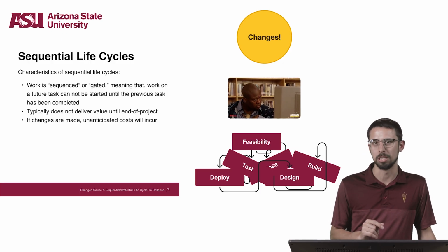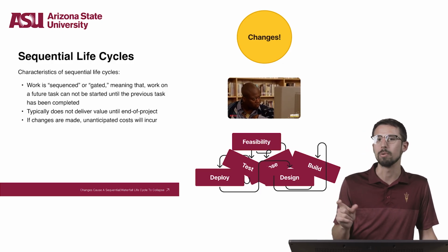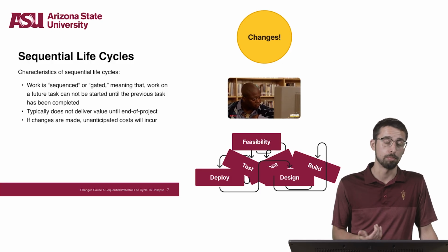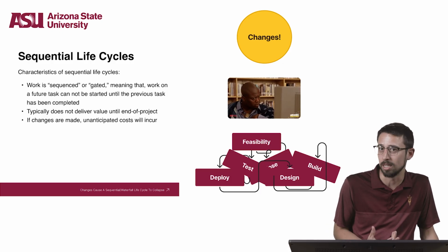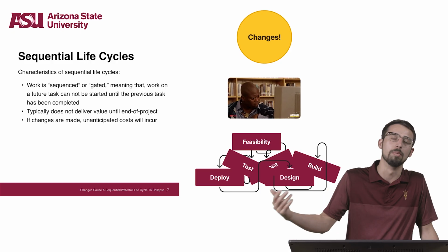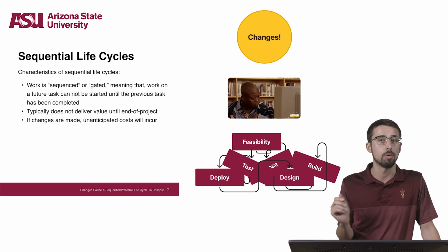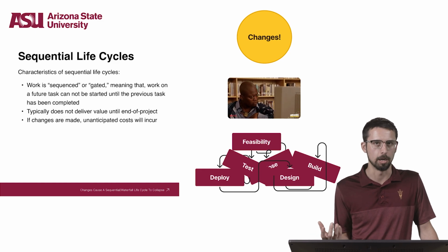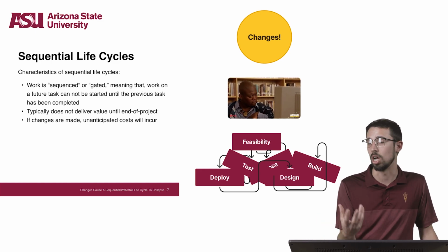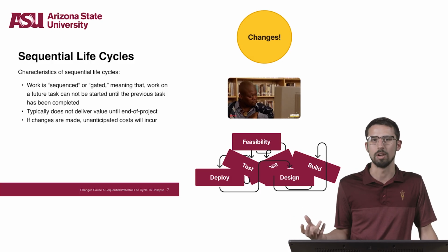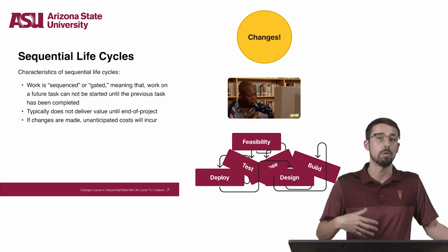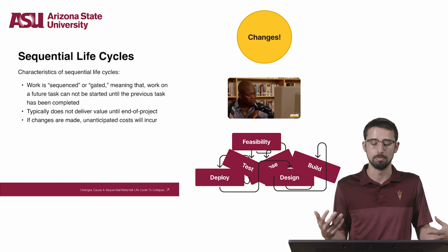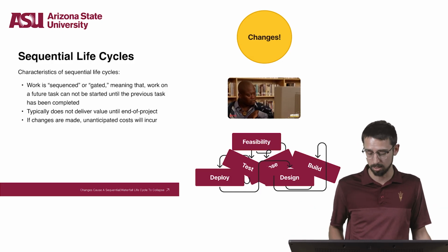By emphasizing a departmentally efficient and serialized sequence of work, sequential projects do not typically deliver business value until the end of the project. If the sequential project encounters changes or disagreements with the requirements, or if the technological solution is no longer straightforward, the sequential project will incur unanticipated costs, to say the least.